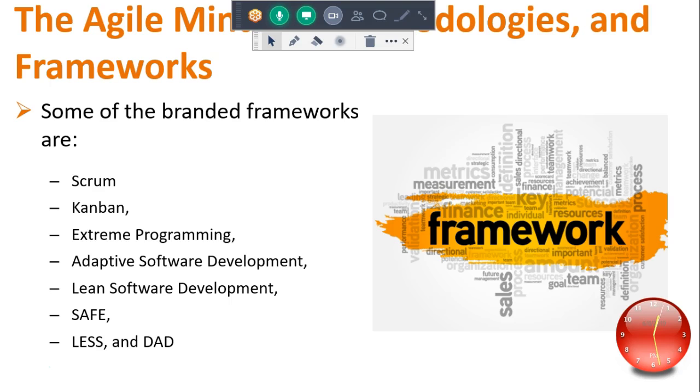The organization agrees that there is only one thing that can be worked on that's critical at any given point in time. So for that entire flow through whatever steps we have in our Kanban process, there can only be one item traveling that route. Everything else drops underneath it.